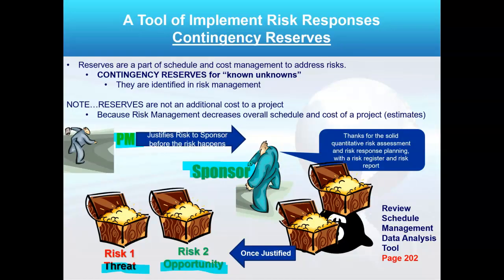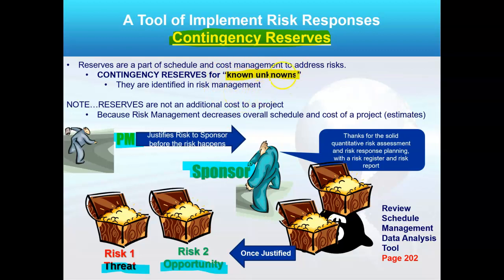There is this term in project management called contingency reserves. With contingency reserves, that's what you're planning for. Remember, we write down the initial plan in the risk register, but then we're going to plan and finalize it. This is for known unknowns — we know it's a risk, but the risk itself is an uncertainty, so what we don't know is if it will trigger or happen. The project manager identifies the risk, does some planning, and justifies it to the project sponsor — your boss, whoever owns the budget.